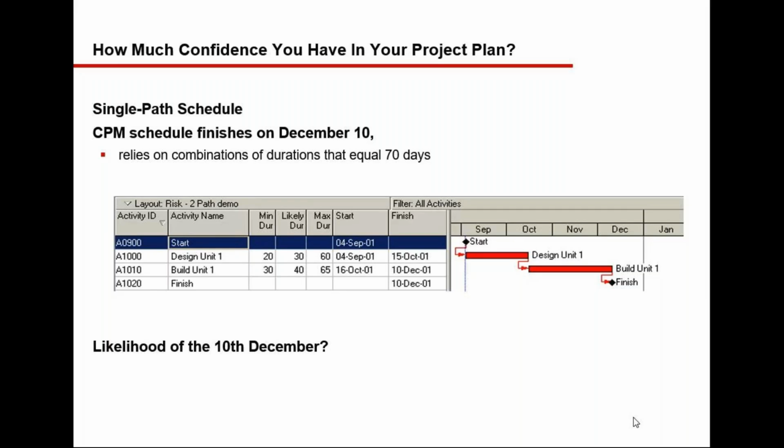You have something called the PI matrix, or probability impact matrix. Based on that, a score will be calculated for that risk. The top 10 scoring risks are identified and taken up for further analysis. That is your quantitative analysis, right?